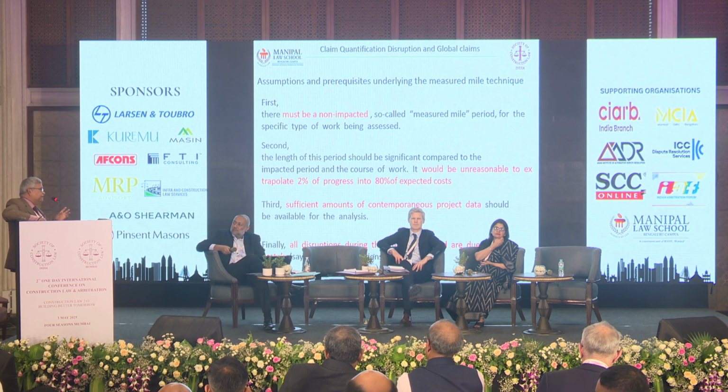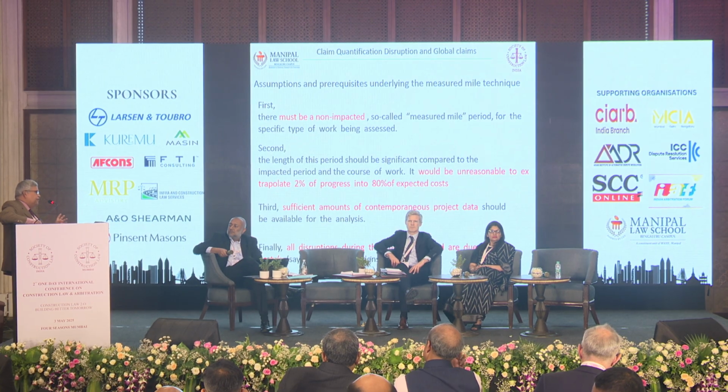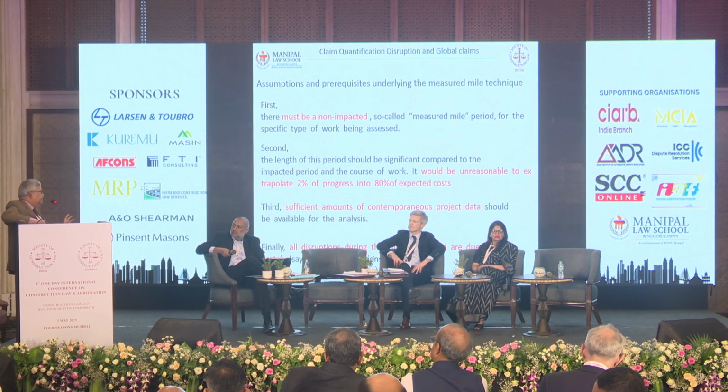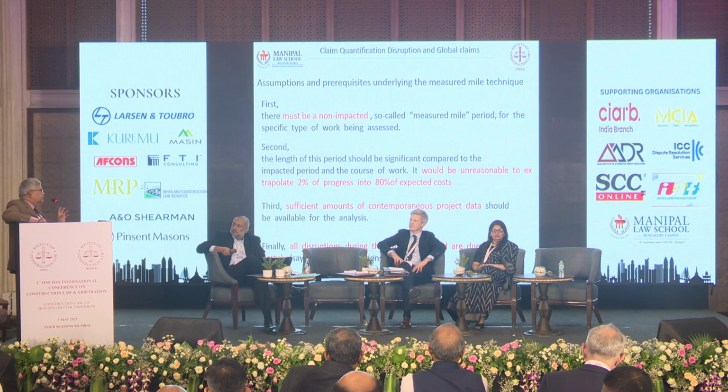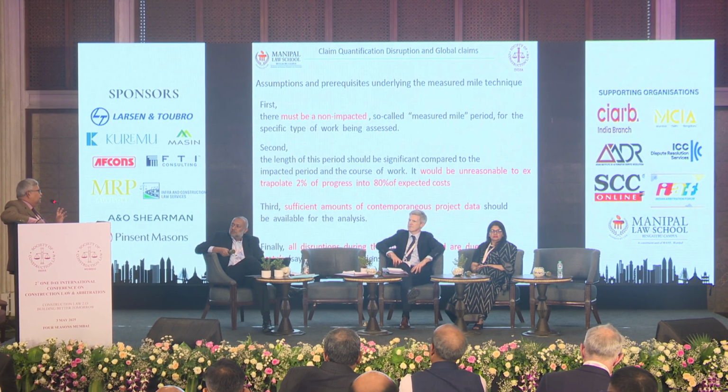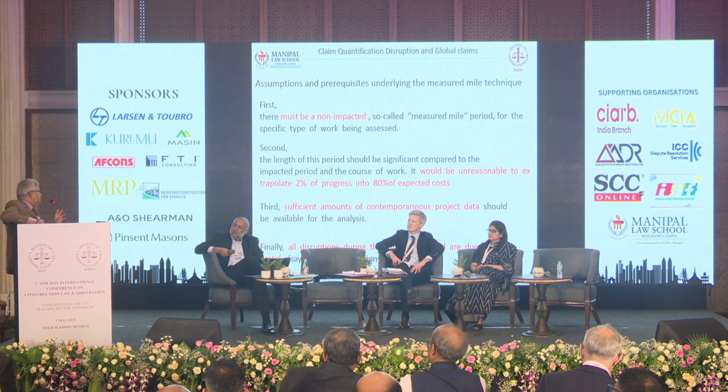If they are smart enough, they will be able to agree that these are all the periods where there was a learning curve, there is a new team mobilized. We are not claiming for this. We are only claiming for the employer cost disruption. Then he will have a better way of proving that for a compensation. I guess I have answered you.